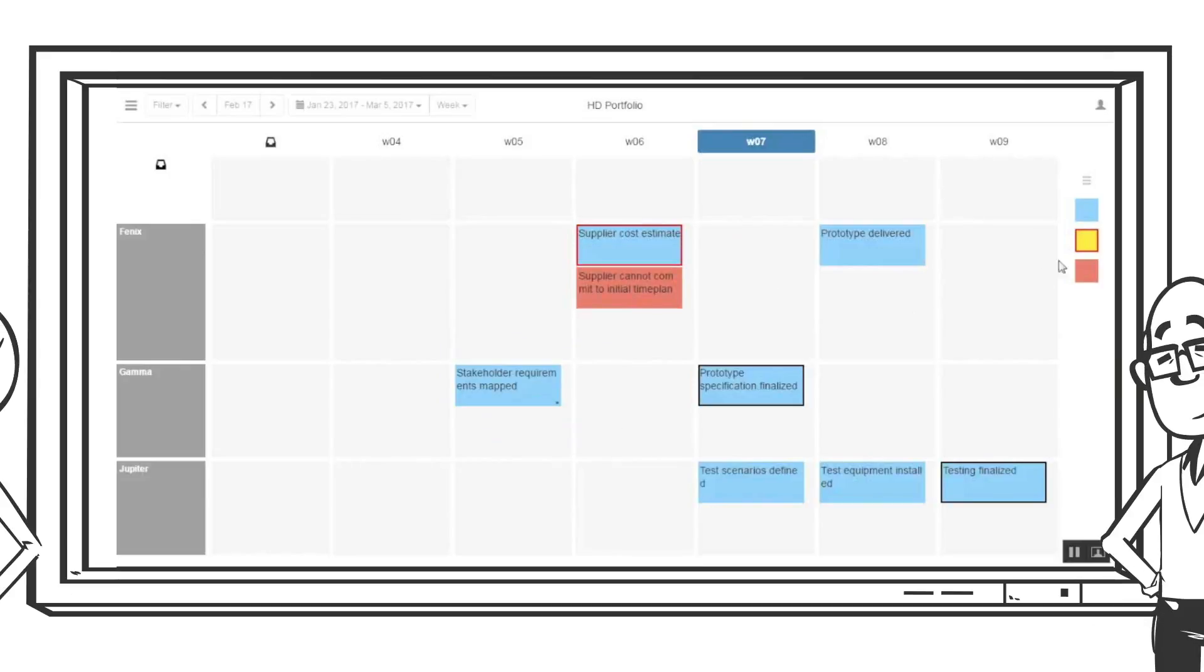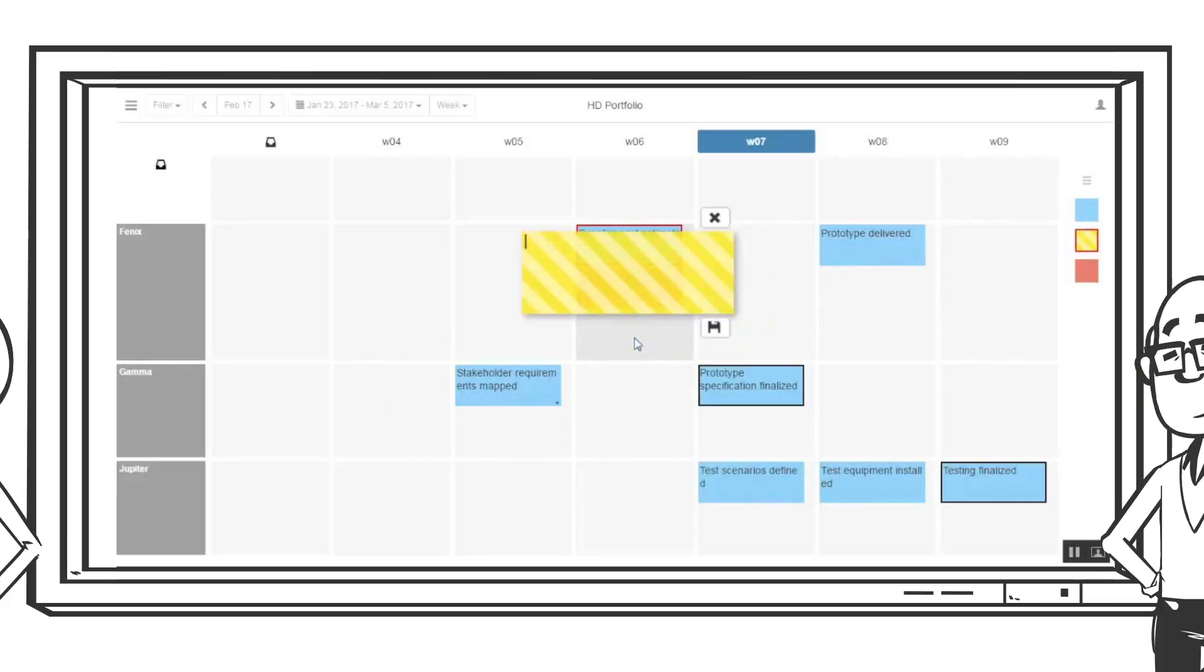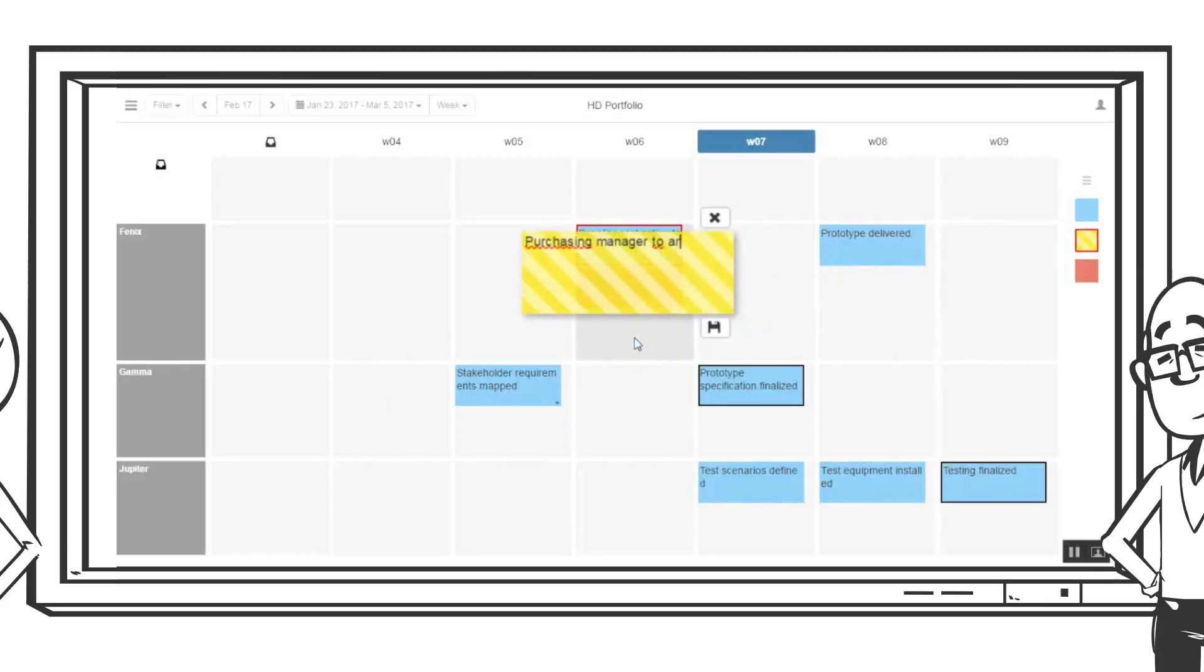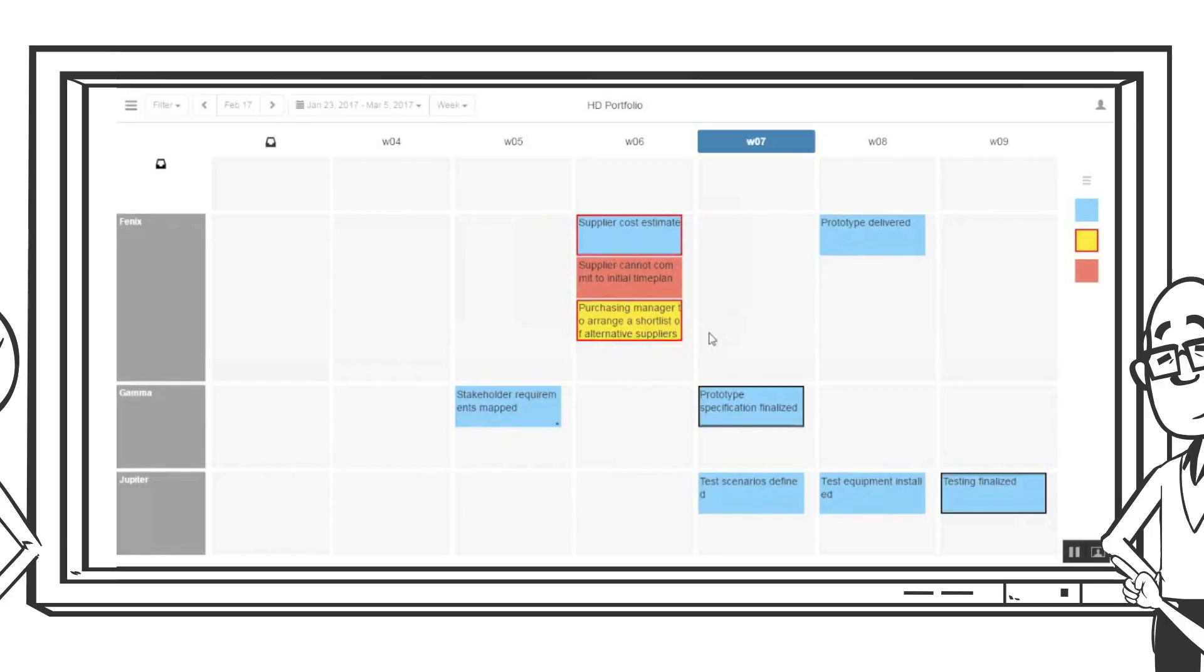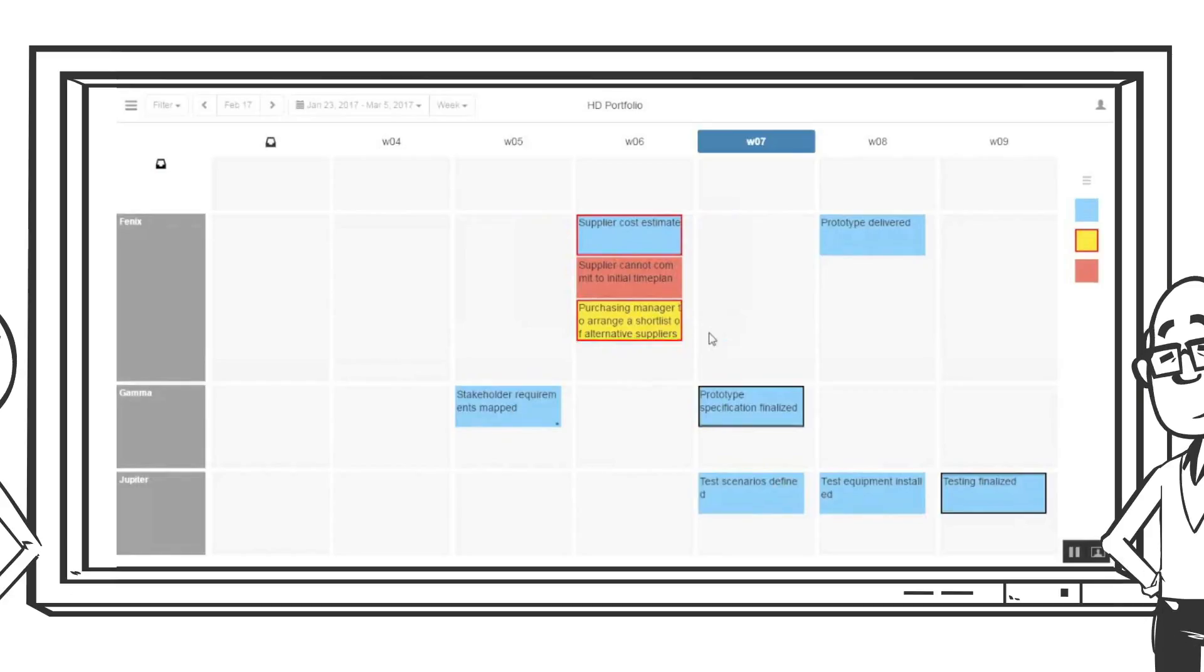It is decided that Phoenix is far too strategic to delay, so the purchasing manager gets the task to provide Phoenix with a short list of alternative suppliers. The yellow note shows up in Phoenix inbox as it is something they will have to plan activities for.